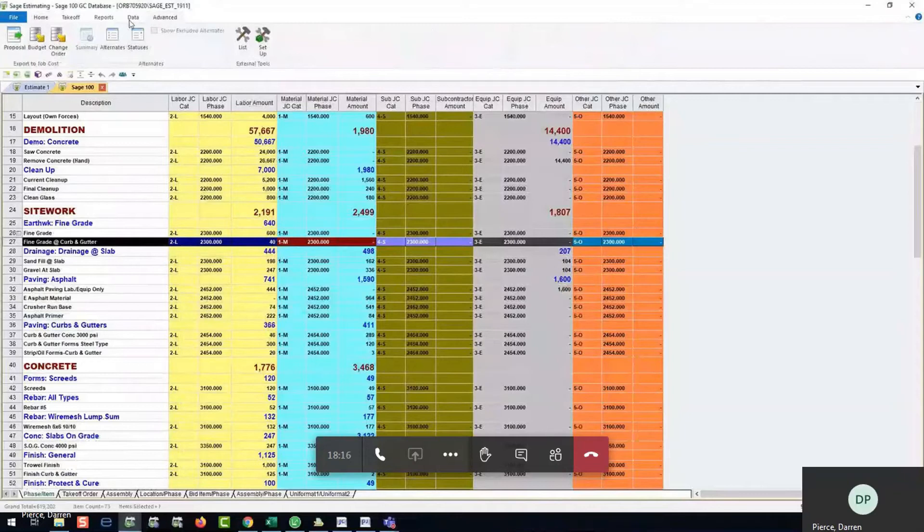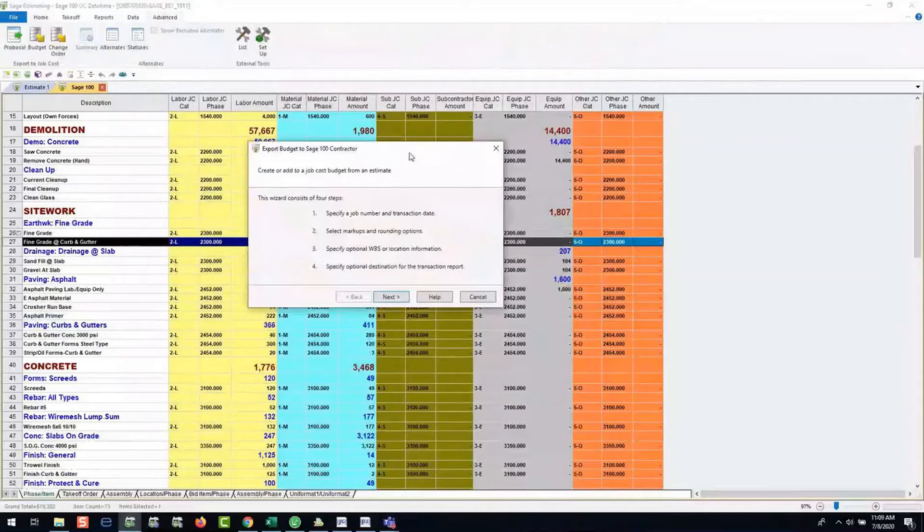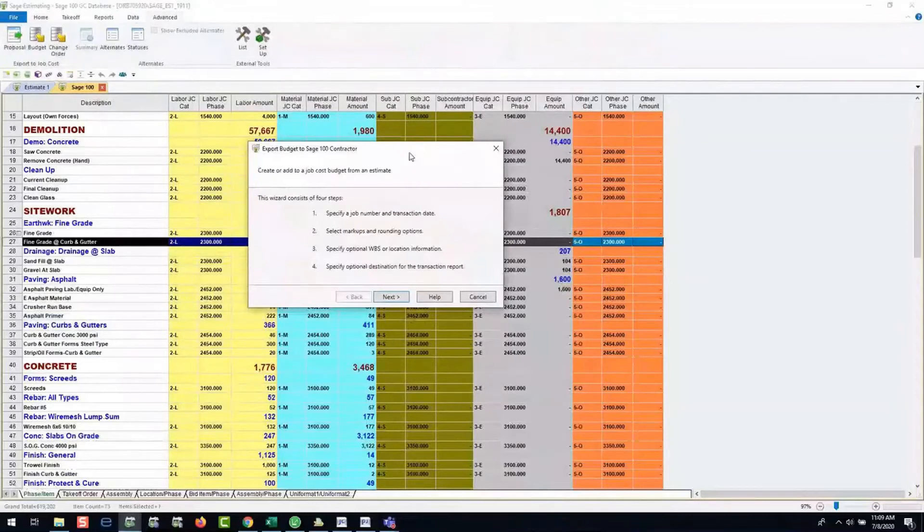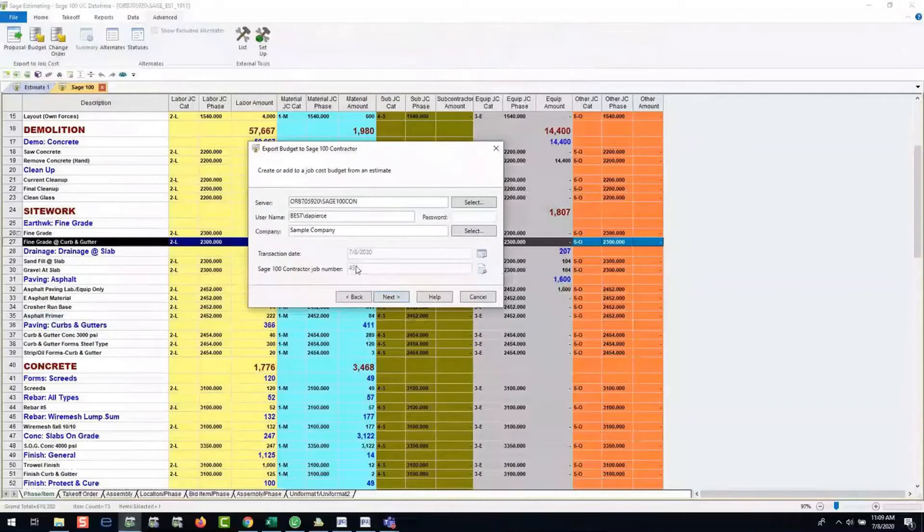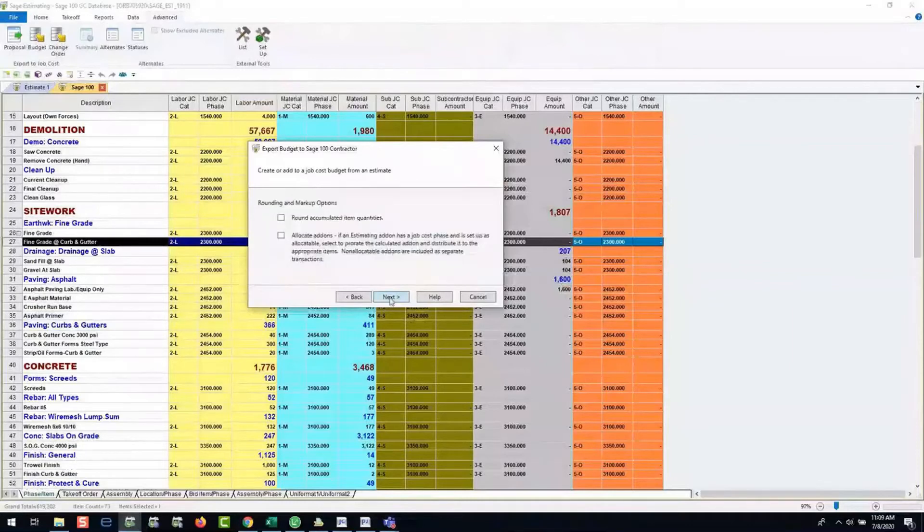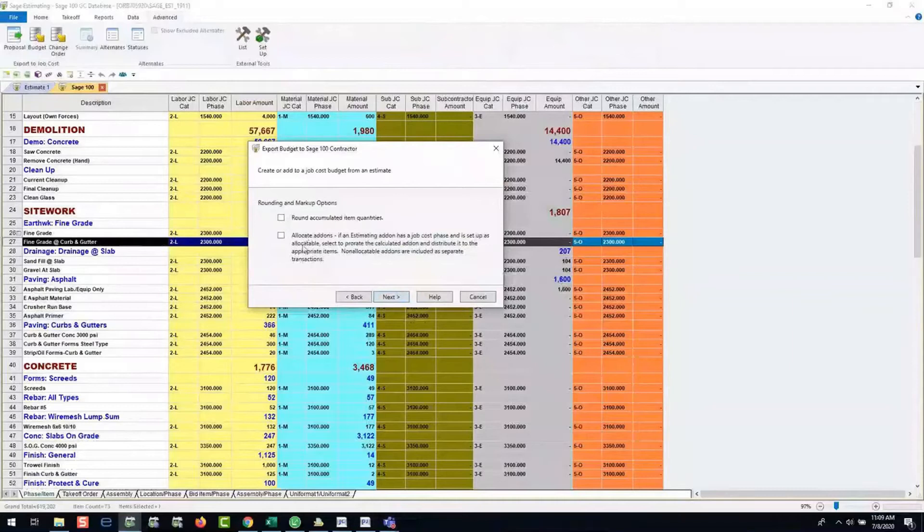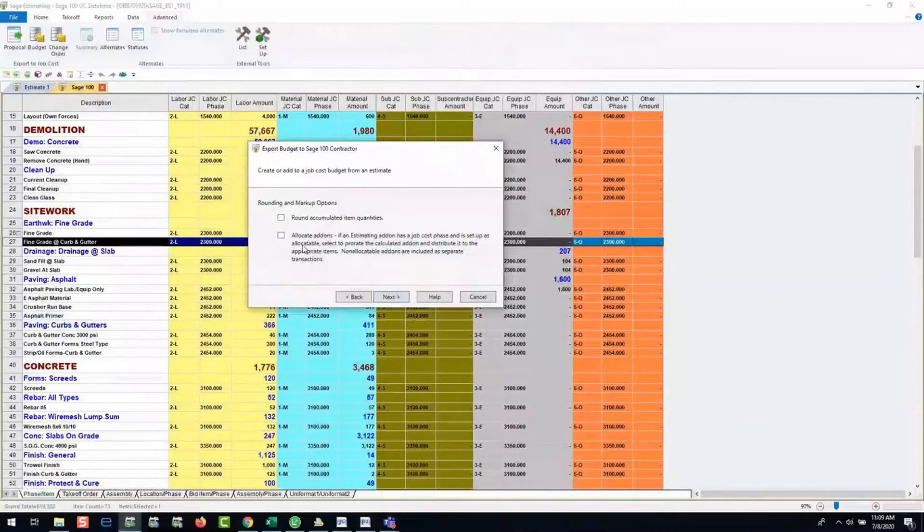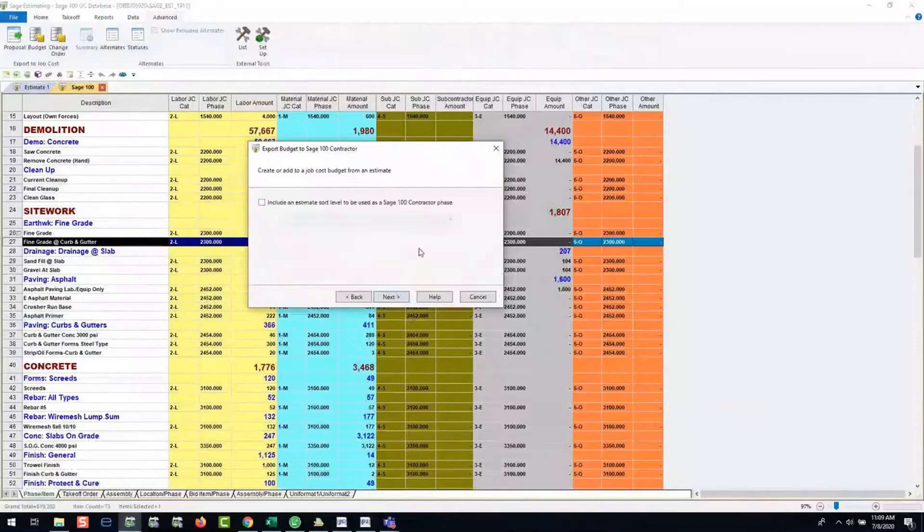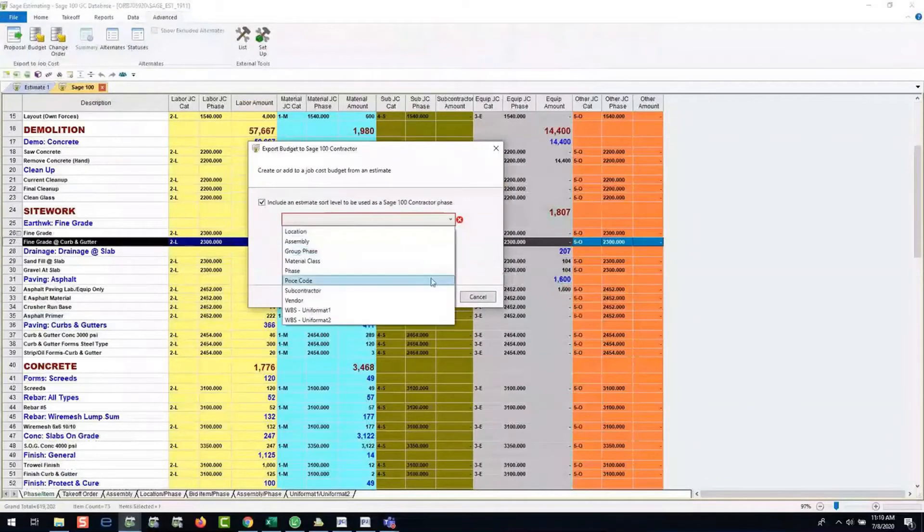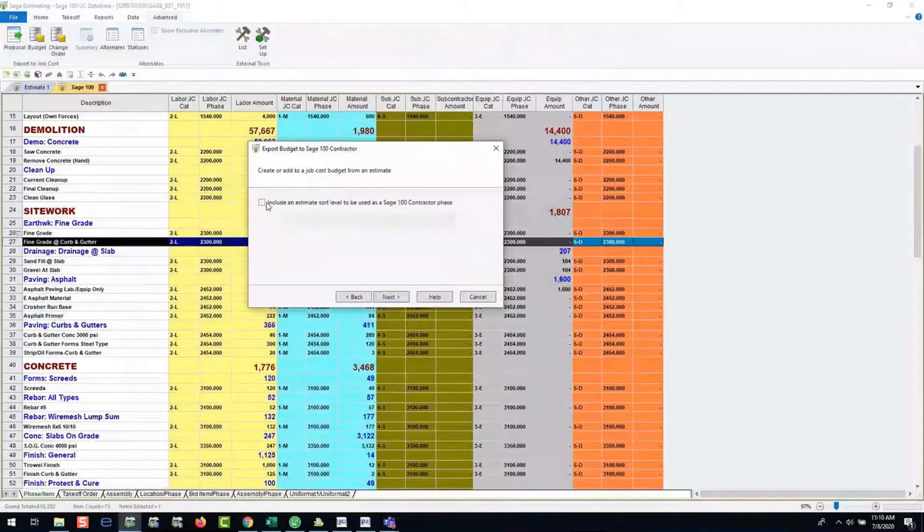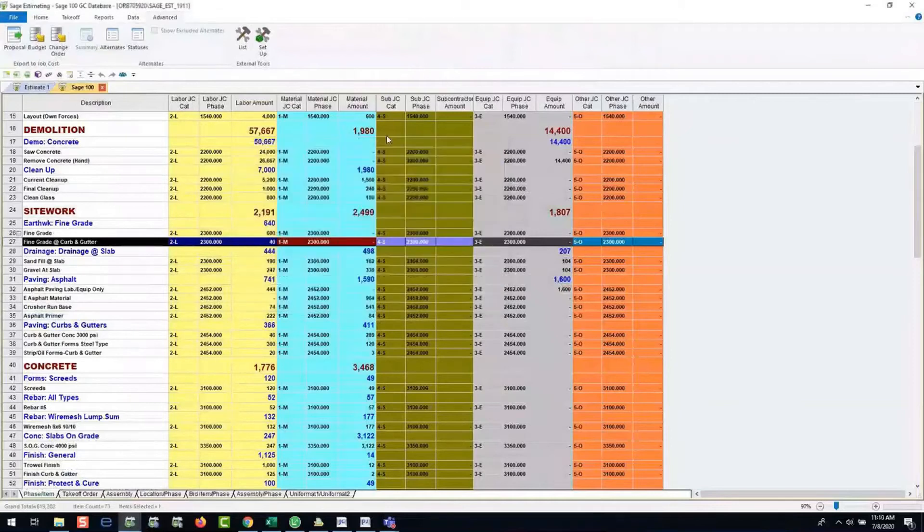So we've got a couple functionalities here. I'll just go through one of them. We've created a wizard that will walk you through the steps. So we don't even have to really do too much thinking here. It's going to take us through the steps and take us to the conclusion of creating the budget. So I'll go to the next step. Up here, of course, this is the SQL database that we're working on. Here's my information. Here's the job number. And here's the date of the transaction. I can go further into the process here where we round the accumulated item quantities, if you'd like. Allocate the add-on. So really when we're looking at allocating those add-ons, do we want that to be part of the body of the estimate or do we want to break those markups separately? We can do that as well. Then we can, of course, have another way of sorting or slicing up that estimate downstream from here as well. It could be a WBS code, so on and so forth. Give you a lot of capability, a lot of customization that can conform to your business. But I hit the finish, so on and so forth. So we'll jump over into Sage 100.